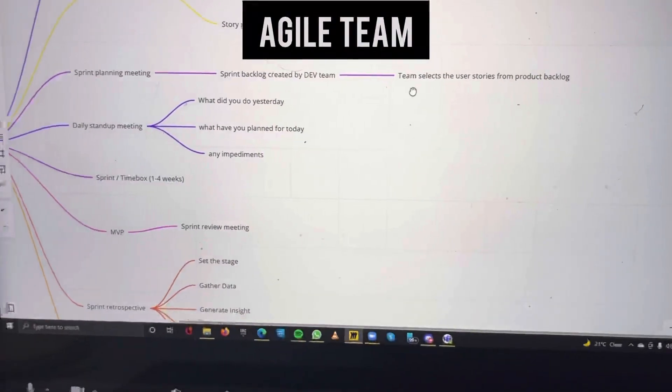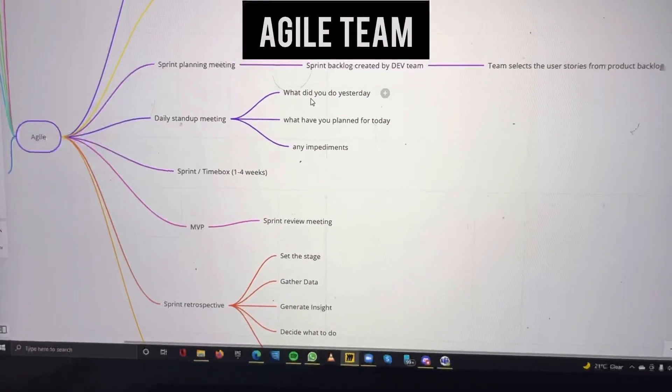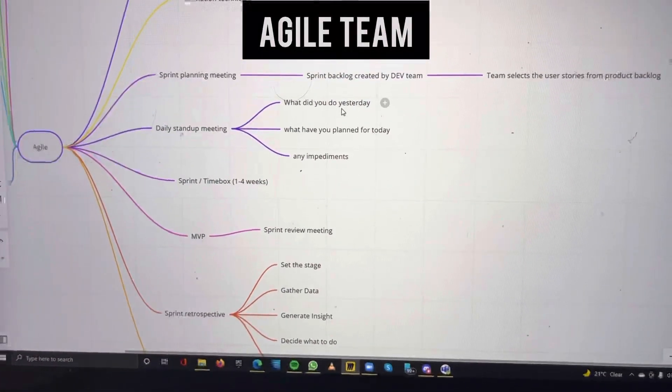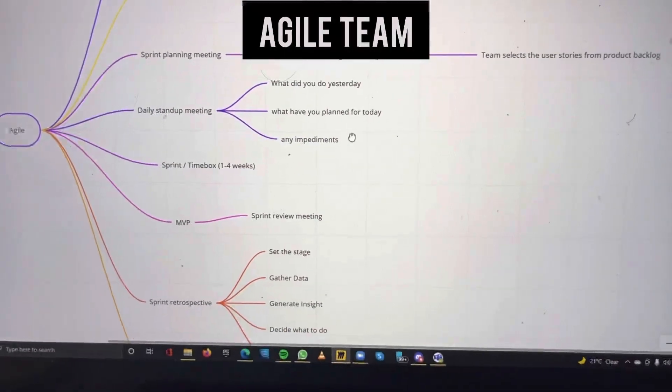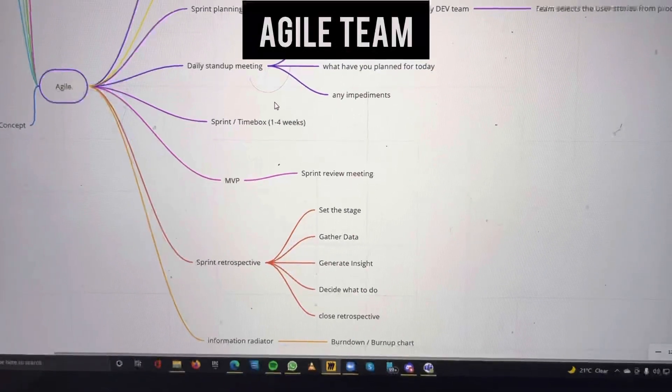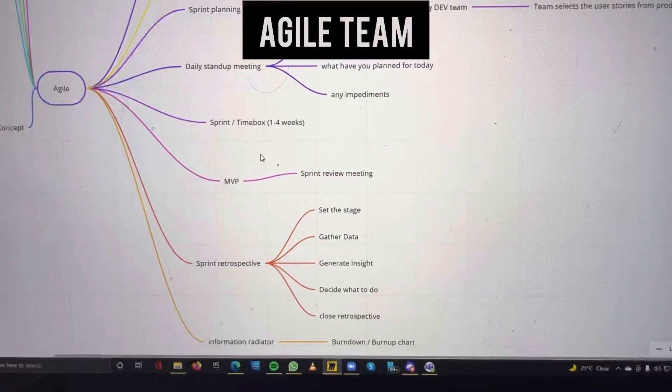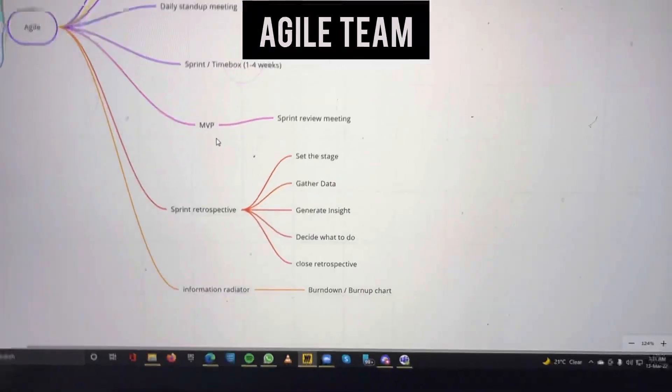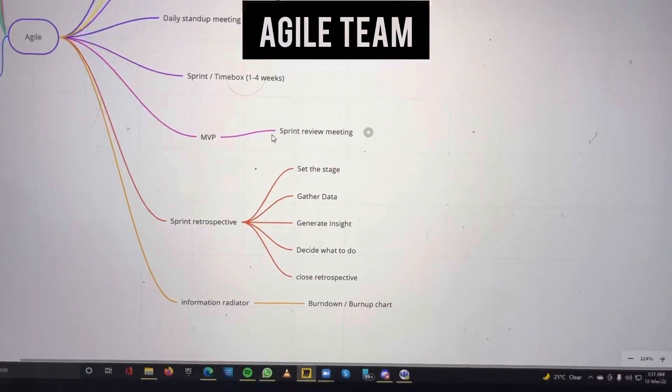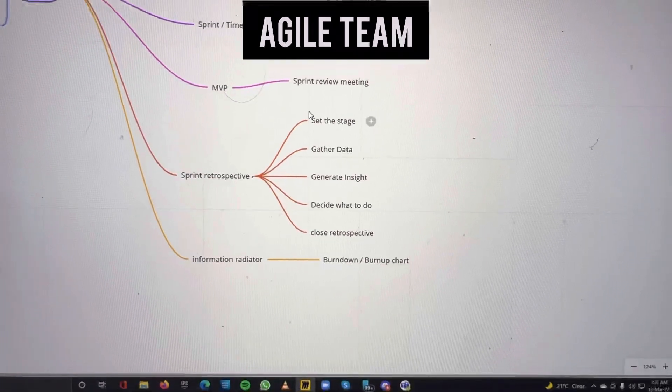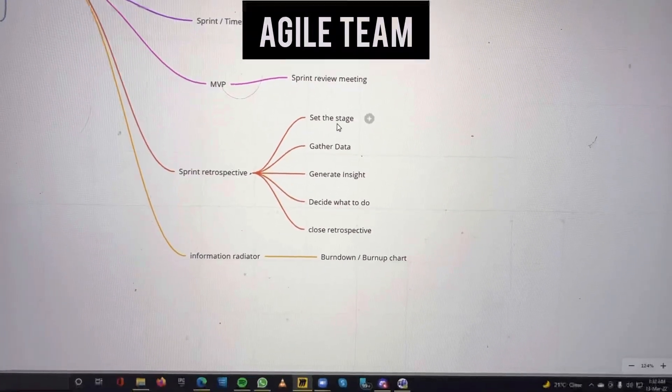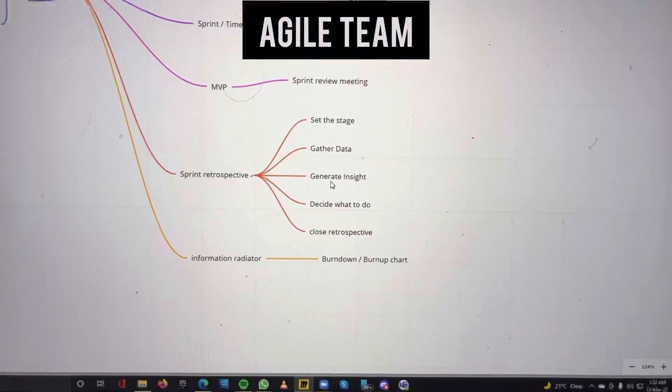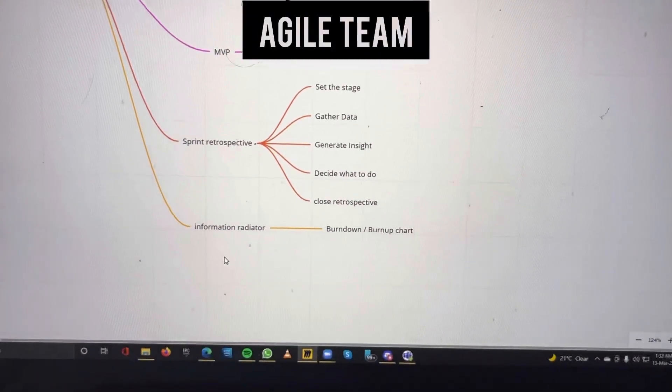In the daily stand-up meeting we ask three questions: what did you do yesterday, what have you planned for today, and any impediments you have. The sprint is one to four weeks and we generate the minimum viable product. Then it goes to the sprint review meeting. Sprint retrospective involves setting the stage, gathering data, generating insights, deciding what to do, and closing the retrospective.